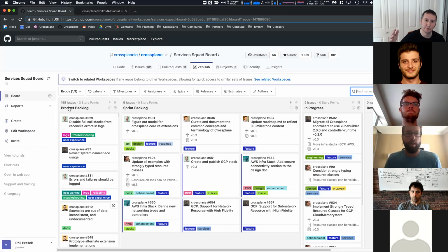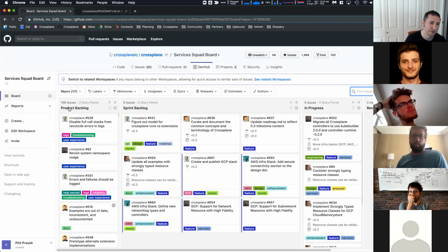I basically set those up so that we're doing 2-week sprints. We have the refinement meetings at the same time in the middle of the sprint. And so then we can start getting the backlog prioritized here, and we can just pull from the top of the backlog.